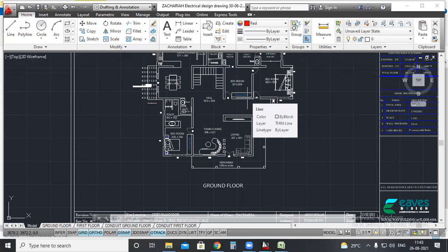And finally, after completing the layout, we have to prepare the conduit drawing also. Have you seen any conduit drawing, or do you have an idea how to prepare one? The main purpose of the conduit drawing is to make sure that all conduits are laid before the plastering works. So through the walls, it is not important to prepare the conduit drawing. Mainly you need to prepare the conduiting through the ceiling.